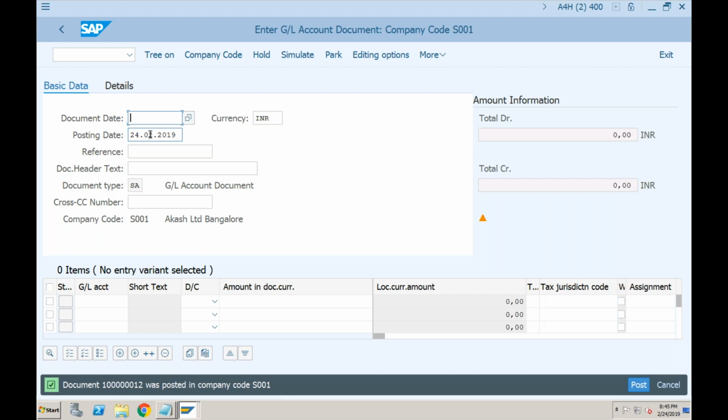Okay, have you understood now what is budgeting, what is availability control, what are tolerances, where you can set up the message that at 80% I need a warning, at 100% I need an error. So all these things are controlled via budget. And also, if you want to extend the budget, you can do supplements. If you want to reduce the budget, you can go to returns. So that functionality is also provided in the budget.